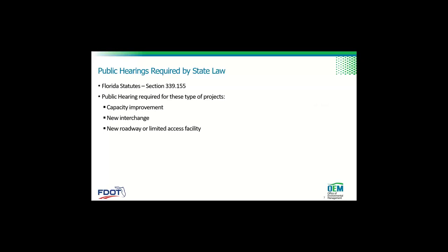Florida Section 339.155 in the Florida statutes requires hearings for, as I mentioned before, capacity improvement, new interchanges, or new roadways or limited access facilities. In addition, you may know that when we change a median opening, public hearings are required if the median change was not included in the PD&E process.